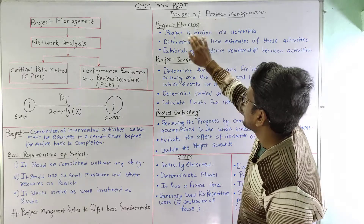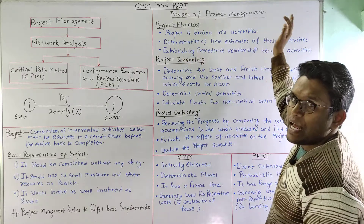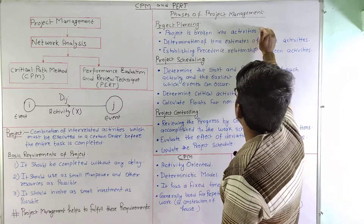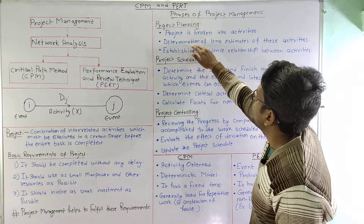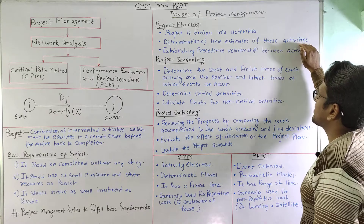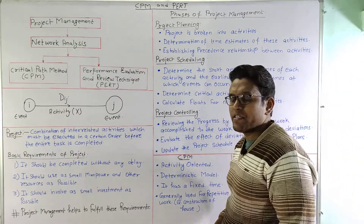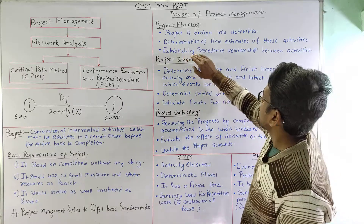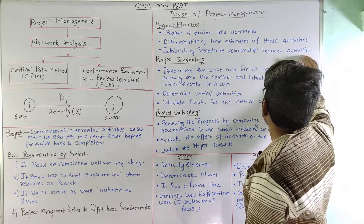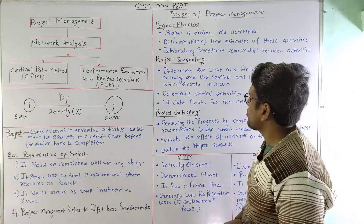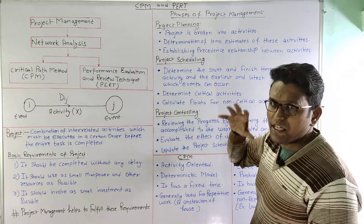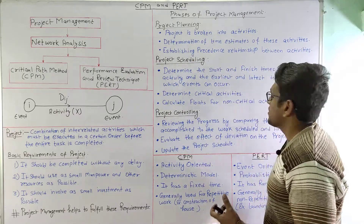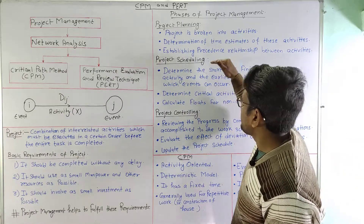In project planning, the project is broken down into individual activities. Second is the determination of time estimates of these activities — how much time a particular activity is going to take. Third is establishing a precedence relationship between the activities, based on which we will construct a network.